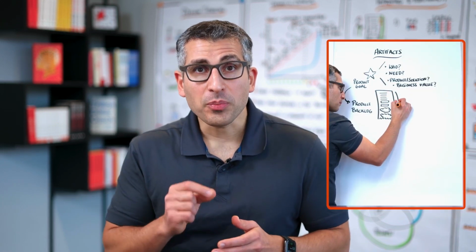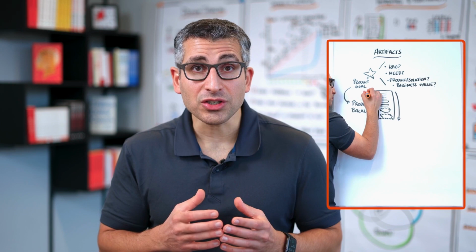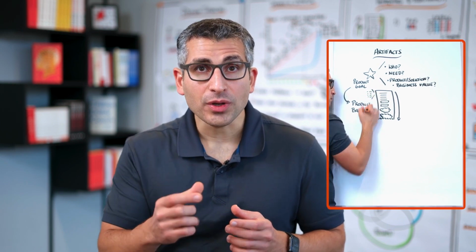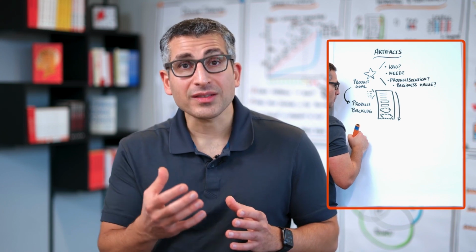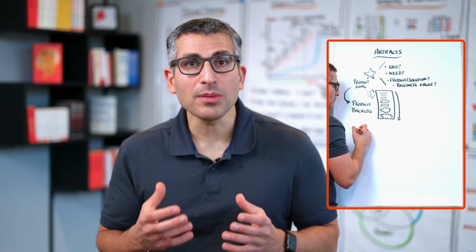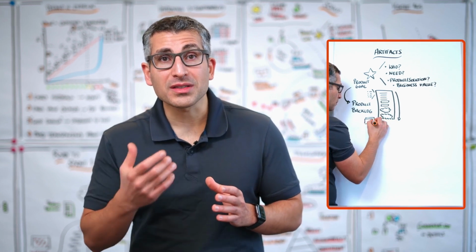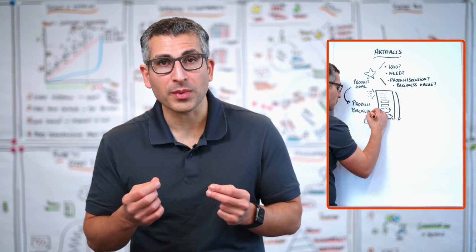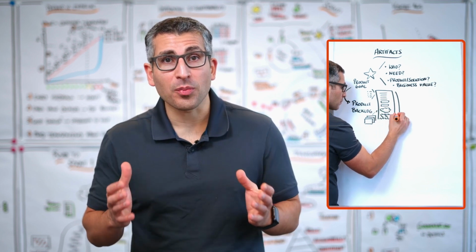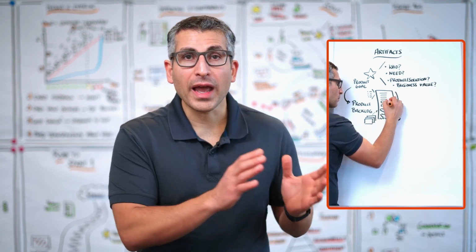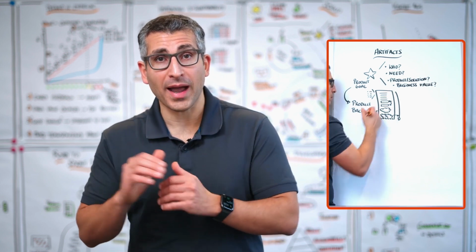First, every product backlog should be prioritized. And based on that prioritization, the items at the top should be detailed down, including acceptance criteria, whereas the items at the bottom can be more vague. Second, every product backlog should be considered being a living document, which means we will constantly reorder the items in our product backlog, and we will add new items to the backlog and remove some older items from the backlog.